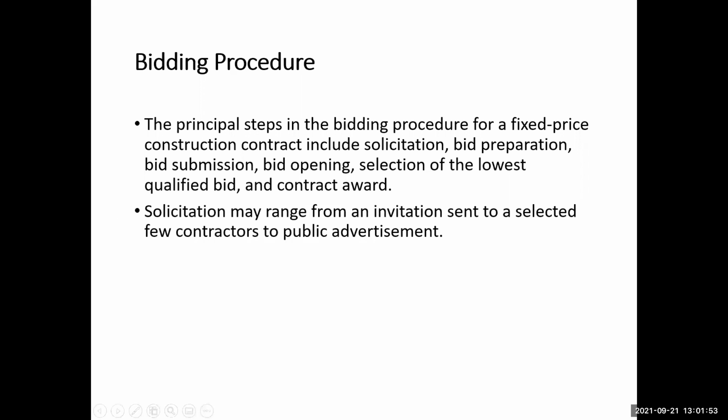The solicitation may range from an invitation sent to a selected few contractors to public advertisement. So the meaning of solicitation is an invitation for the bidding. The invitation can be to some selected contractors, or it can be through public advertisement, where potentially everyone can bid.